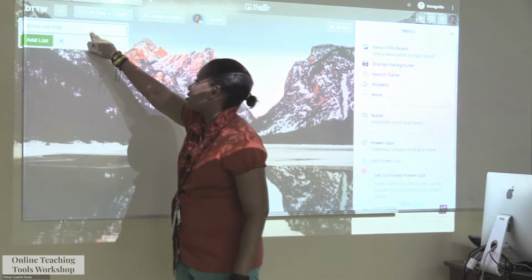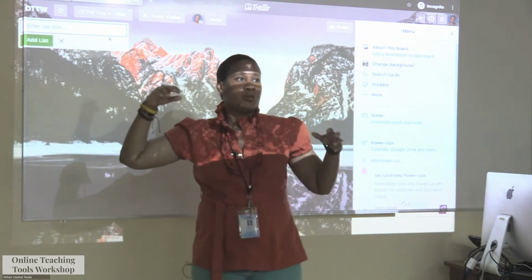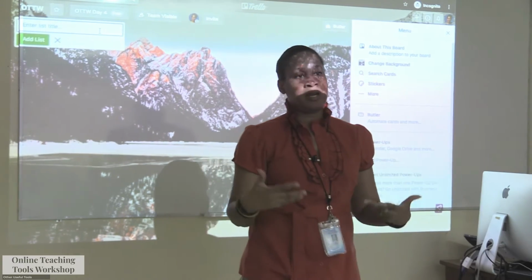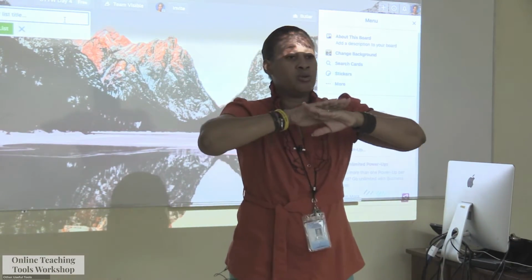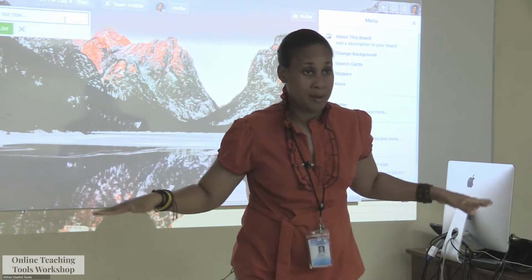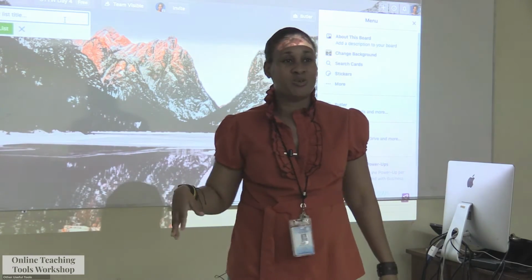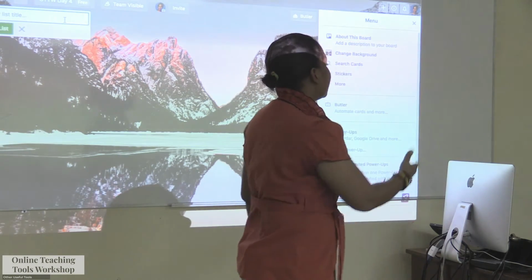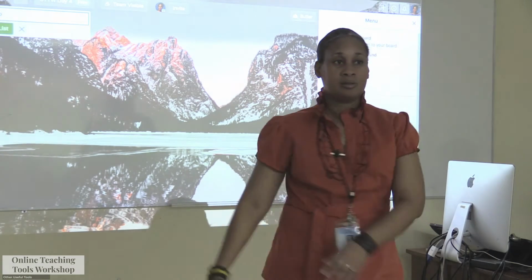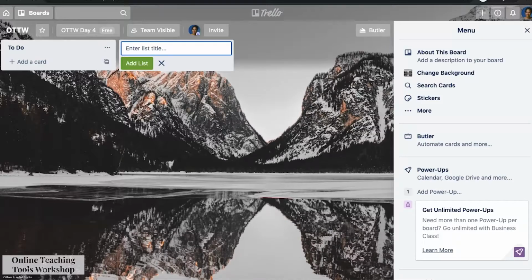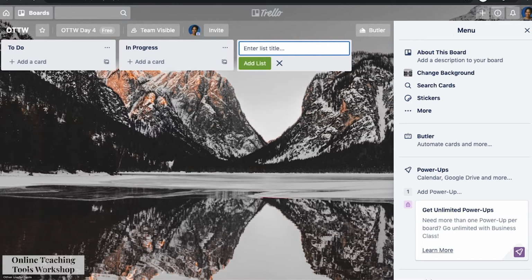Then now we have these things called lists, and the easiest way that I explain to my students, I give them 2 methods that they can use. You can do it more than 2 ways, right? But I give them 2 methods that they can use to flesh out the project. They can have to do, in progress, and done or complete.